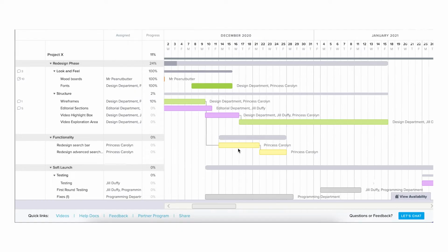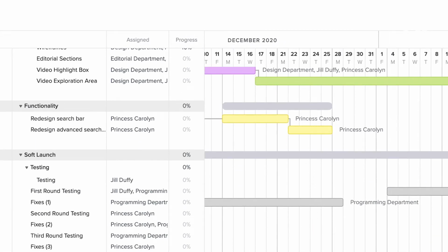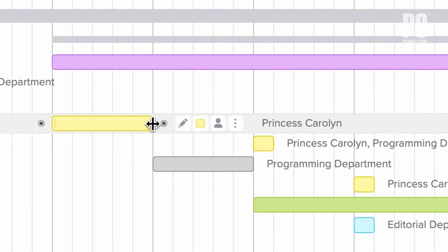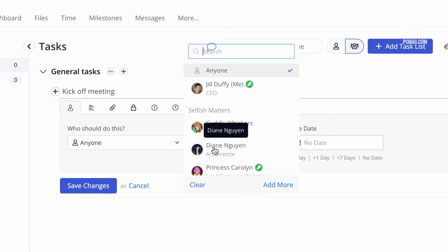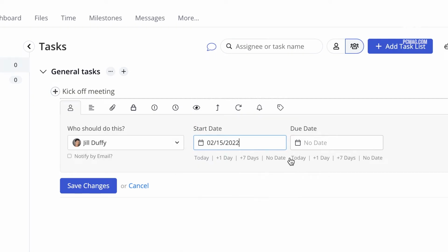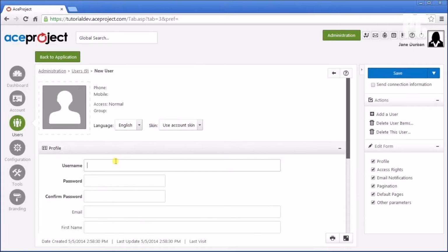Most project management apps also have Gantt charts. And a Gantt chart is nothing more than a timeline view of tasks, showing the order in which they need to be done and how long each task will take. The most advanced project management apps do even more, like budgeting or even people management. At the very highest level of project management apps, you'll find features like automatic rescheduling, and not just for tasks and internal people, but also contractors or even equipment that you might have to share across projects.